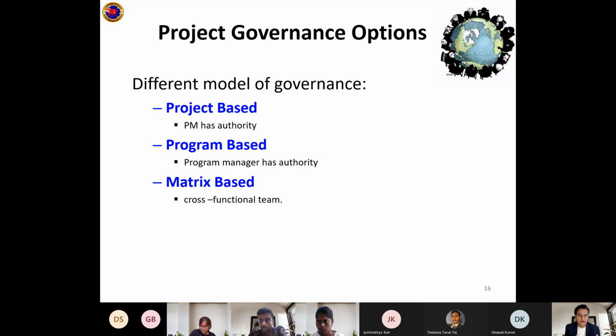So that is your logic, Shreya, that because I see there are heterogeneous or different types of deliverables, I will use them as separate projects under a program. And therefore there has to be one program manager on top. Shreya, you could be the program manager, but under you, you will have a project manager for civil construction, a project manager for the agricultural part, and maybe another project manager for marketing and sales. Okay, so that's your logic. So you will also be right.